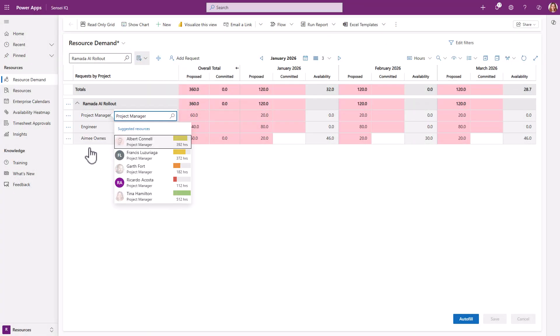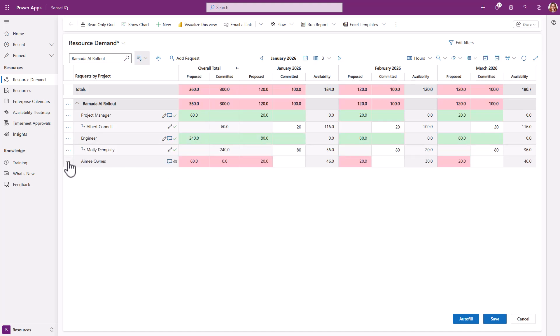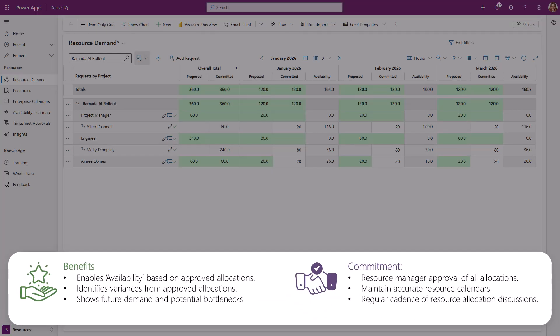If the business case is approved, the resource manager will substitute the generic roles for named individuals, or just approve if named individuals were already requested. You now have an approved resource plan with formal allocations for your team members. There are many benefits to a formal resource management process, including seeing availability based on approved allocations, identifying variances from approved allocations, and showing future demand and potential bottlenecks. To make this all work, it does require a commitment to formal approvals of all allocations, maintaining accurate resource calendars, and keeping a regular cadence of resource allocation discussions and review.